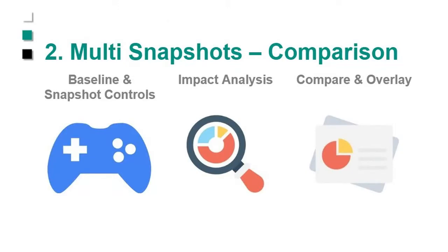So this allows you to do comparisons. So that's another benefit to having a warehouse. What that means is by snapshotting the data, I can have last week's update versus this week's, last year's update on the same week versus this week's. If you're doing operational type work, being able to compare this year to last year can be pretty interesting.